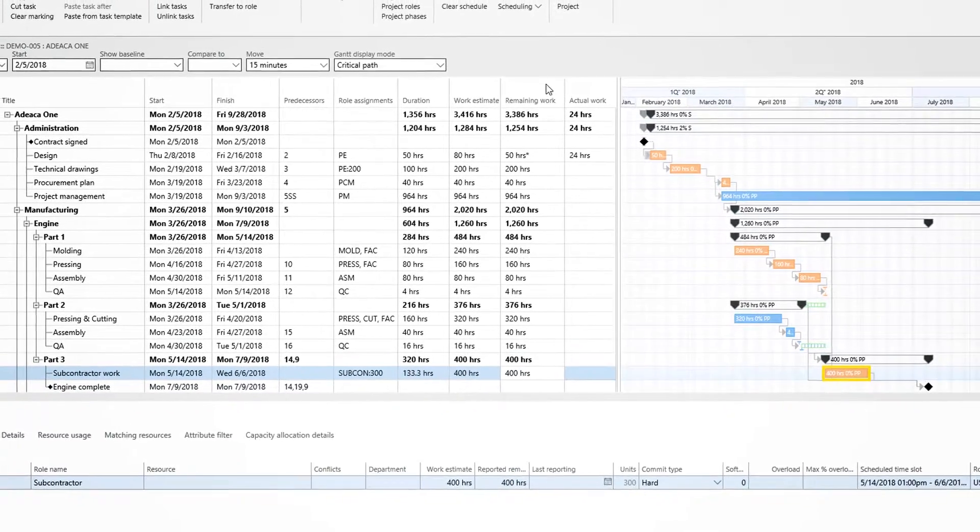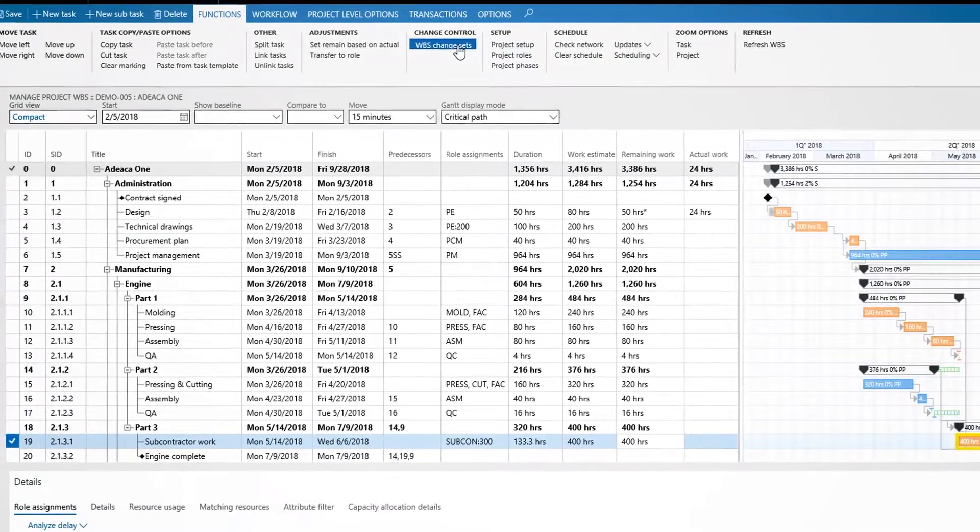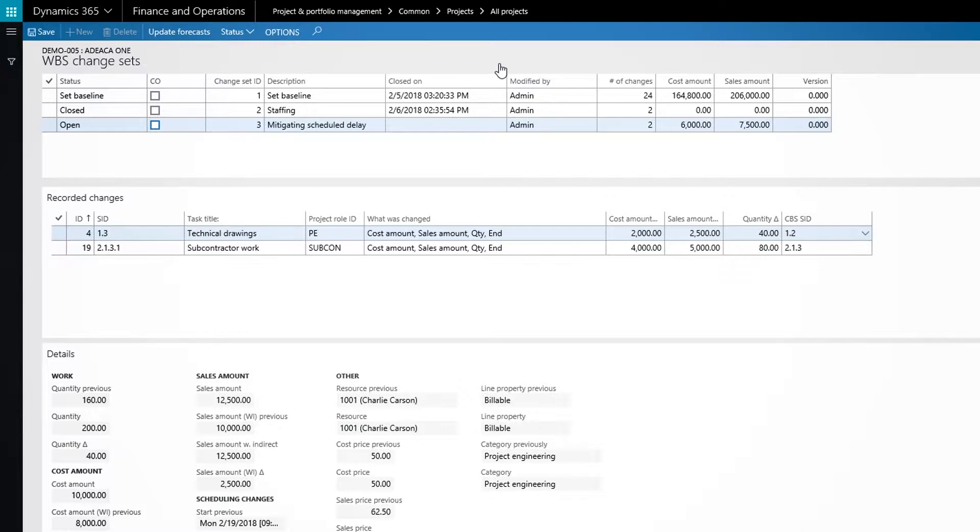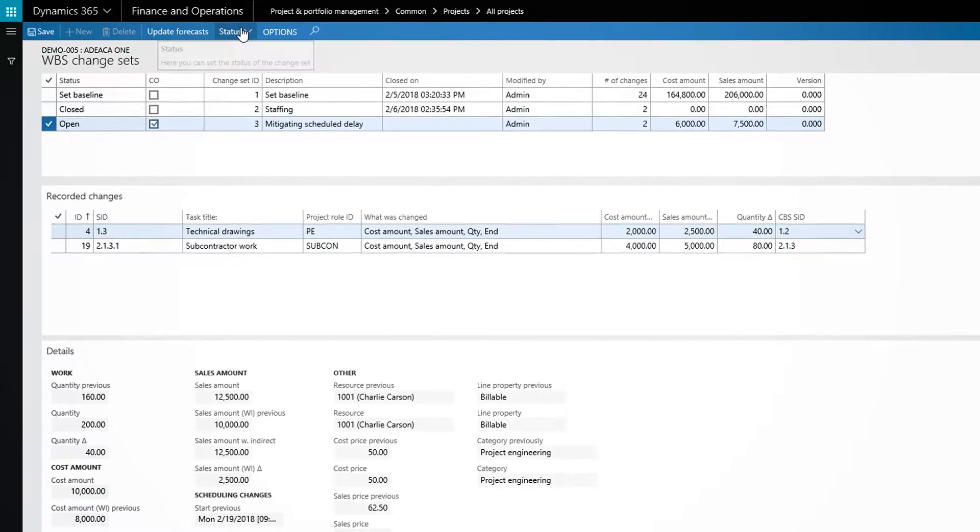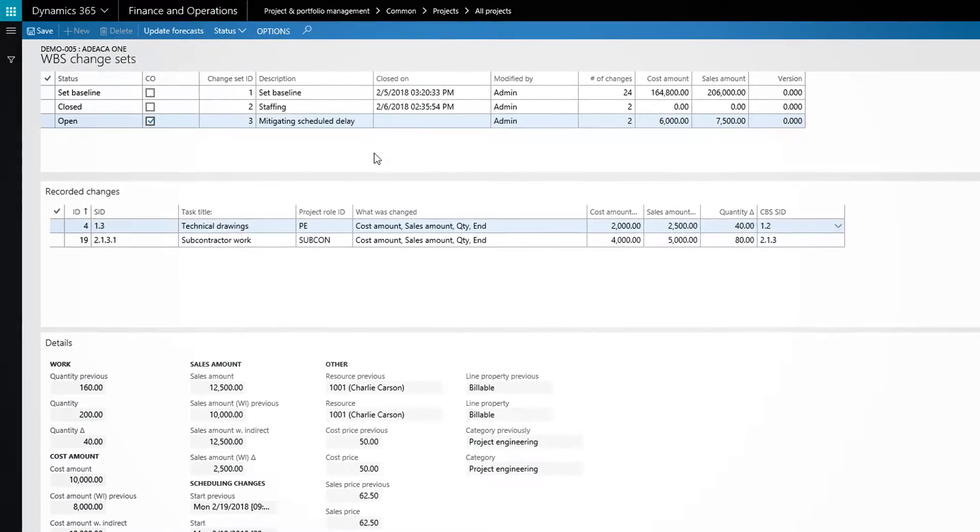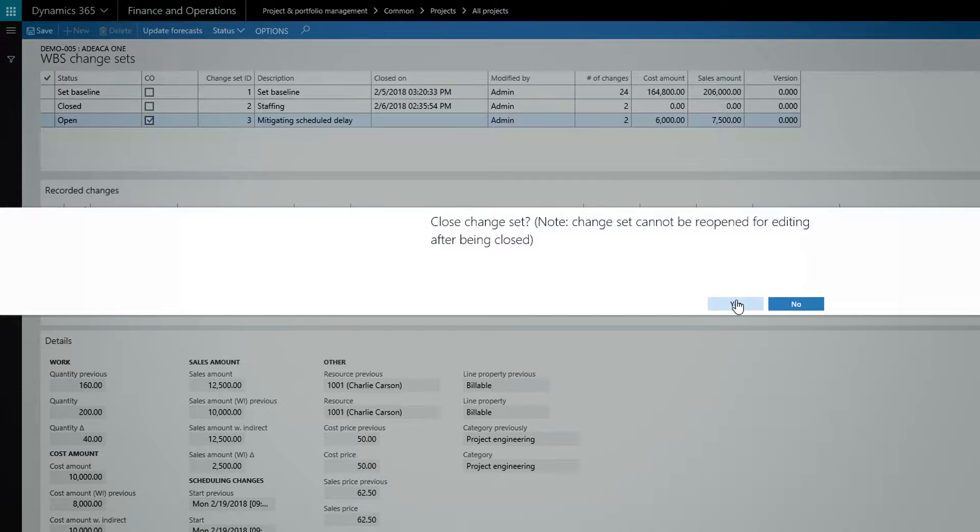In ADECA 1, all changes to the WBS are captured in change sets. A change set outlines the exact changes committed to the WBS as well as the financial impact. Change sets are approved as part of the month-end process and may be designated as part of a change order.